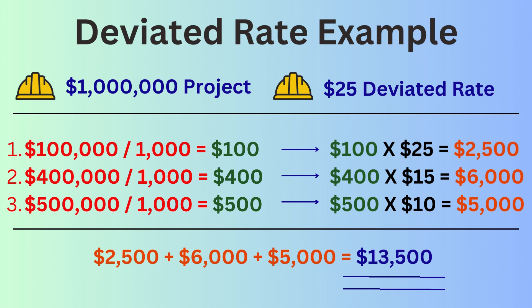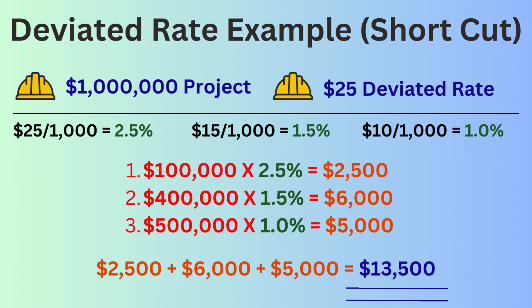Here's how that would be calculated using our $1 million performance bond example. First, take the first $100,000 of value, divide by 1,000 to get 100, then multiply by $25 — that gives $2,500. Next, take the next $400,000 of contract value, divide by 1,000 to get 400, then multiply by the $15 rate, giving $6,000. Finally, take the remaining $500,000, divide by 1,000 to get 500, multiply by $10, giving $5,000. Adding $2,500 plus $6,000 plus $5,000 gives a performance bond cost of $13,500 for a $1,000,000 surety bond.